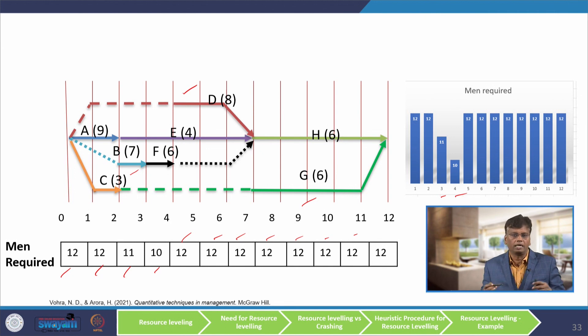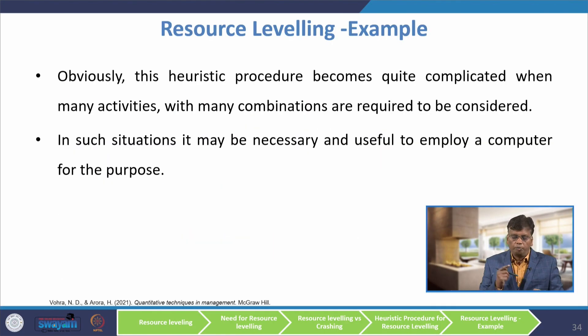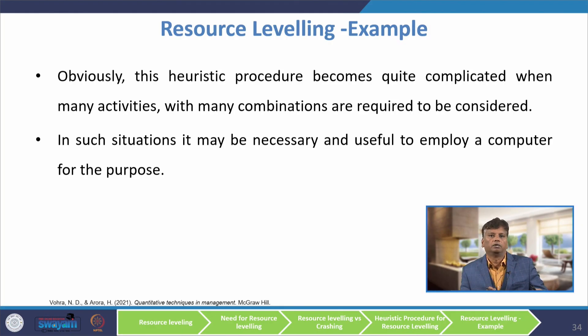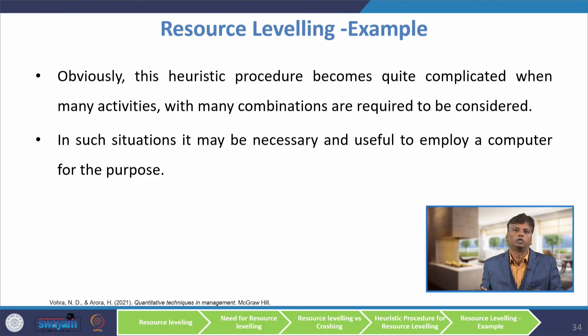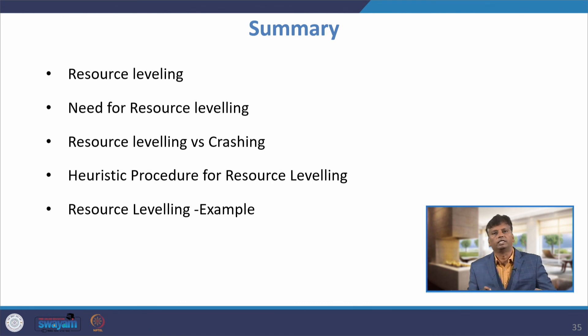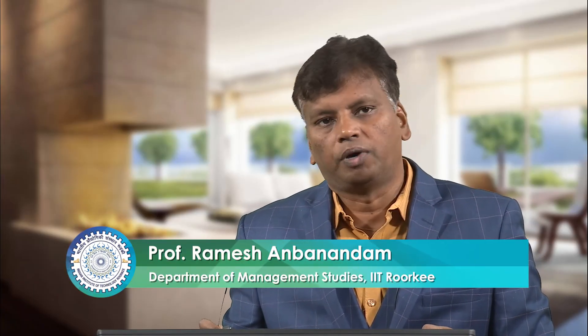When you adjust the early start times of non-critical activities, the manpower requirement becomes equally leveled. This is a trial-and-error heuristic method. If the problem is very large with many activities, manually doing this adjustment is not possible and you have to use optimization techniques and software. This heuristic procedure becomes quite complicated when many activities with many combinations are required to be considered; in such situations it may be necessary to employ a computer. In this lecture I have explained what is resource leveling, the need for resource leveling, resource leveling versus crashing, and with the help of a numerical example using a heuristic procedure, how to do the leveling. Thank you.